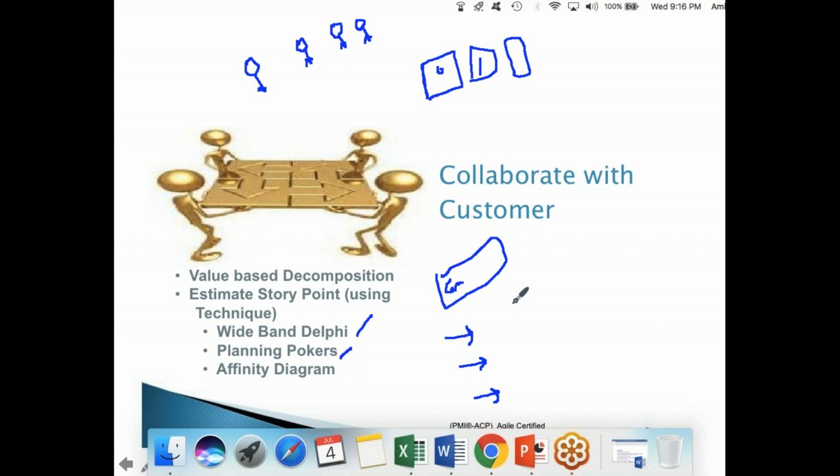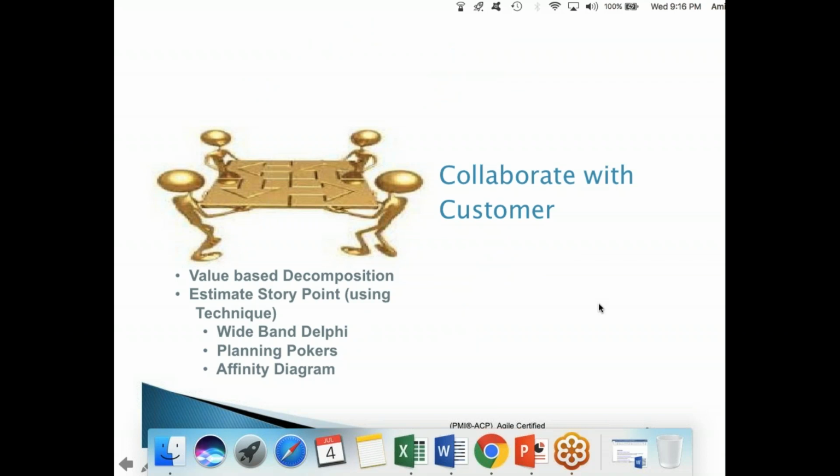18, one shows 18, one shows 20. That's fine. You need not wait for all 10 subject matter experts showing 18 or 19. You should be as close as possible. If you want, I will take the average. I will do the PERT analysis, optimistic, pessimistic, 2 times by 6, or I'll do some average. So they play with it. Yes, testing effort should be included as part of sizing the feature. Yes, it should be done.